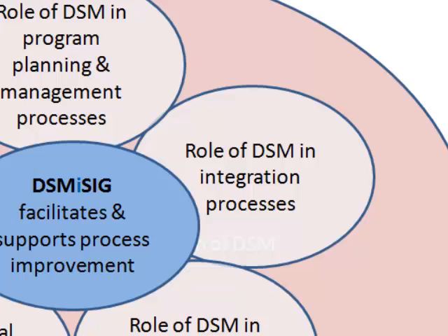DSM does this by facilitating the organization or team's discussion of each element's prerequisites and outputs, and the roles, responsibilities, and commitments of all parties involved. As part of the DSM process, this information is recorded on a map or a model that readily and easily is read and reviewed by all stakeholders.